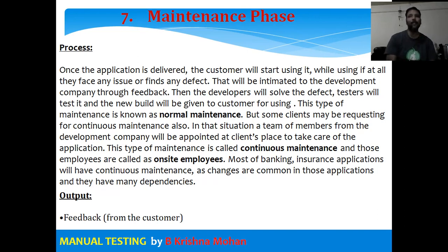A change request form will be there, in which he will mention any changes he wants and give it to the development department. Even in continuous maintenance, he has to give the change request. Otherwise, the on-site developer will not do the work. Whether the developer is on-site or at the development company's location, in both cases, the change request has to be given.